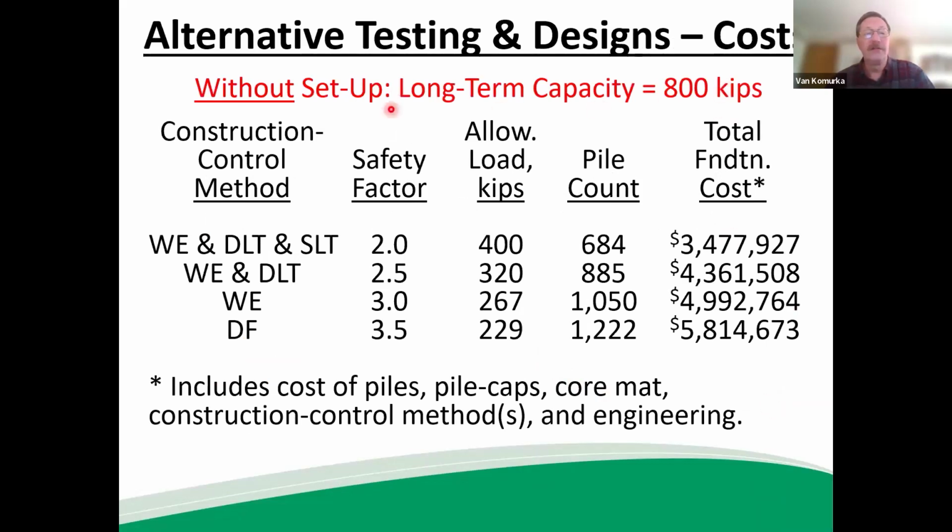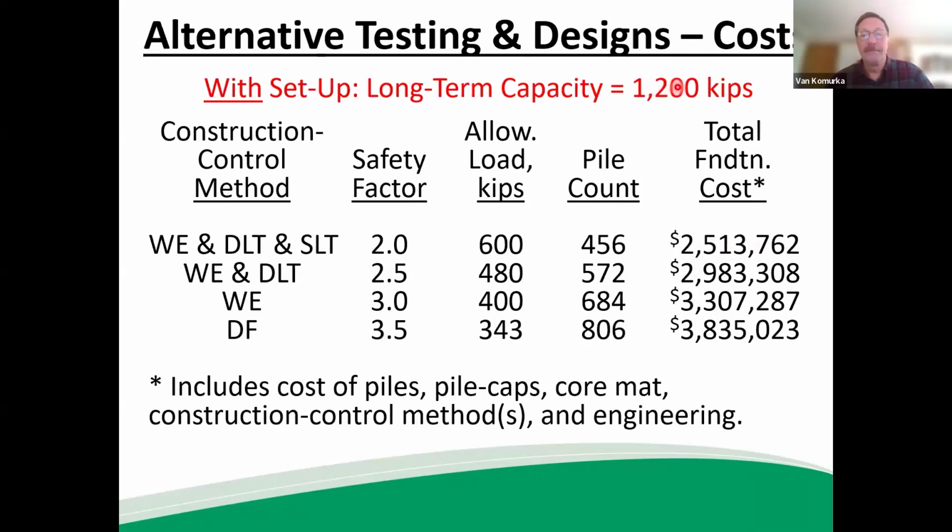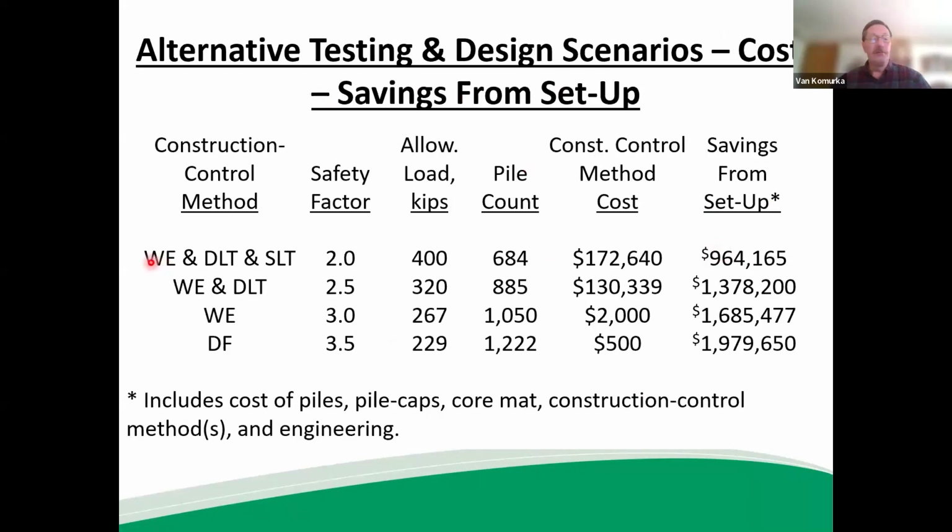This gives us a sense of if we had not used setup, and we'll just talk about the full boat testing program here, the foundation cost would have been about $3.5 million. If we used setup, the total foundation cost, and these costs include the engineering, would have been about $2.5 million. So for the full boat testing program, including the $250,000 that it cost to perform the test program, setup saved $964,000 on the project, even including the cost of testing.